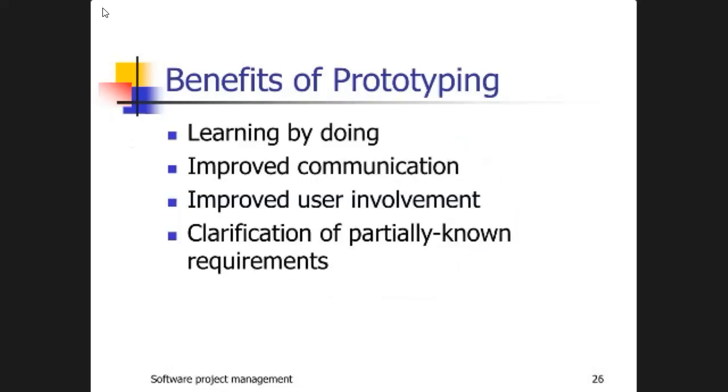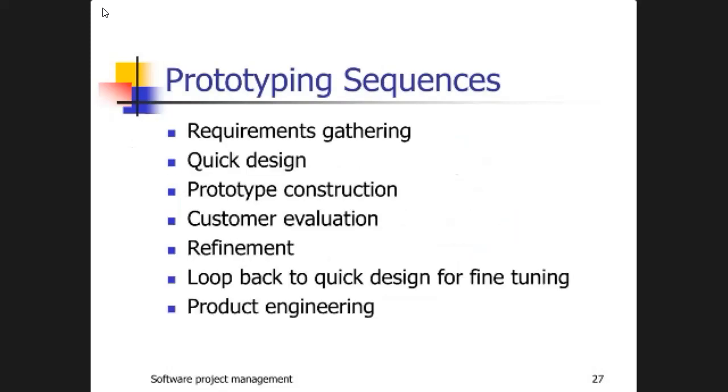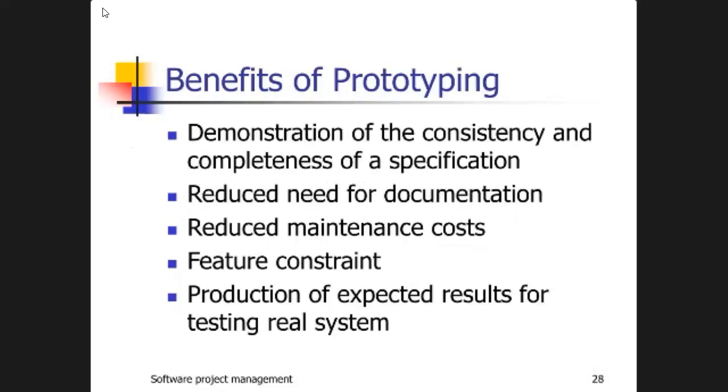Benefits of prototyping: learning by doing, improved communication, improved user involvement, clarification of partially known requirements. Prototyping sequence: requirements gathering, quick design, prototype construction, customer evaluation, refinement, loop back to quick design for fine tuning, and product engineering.